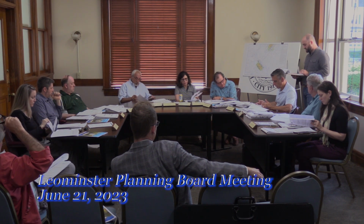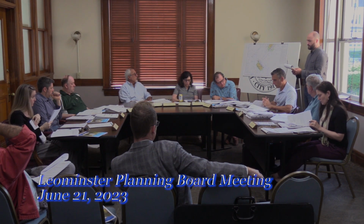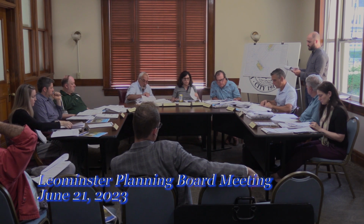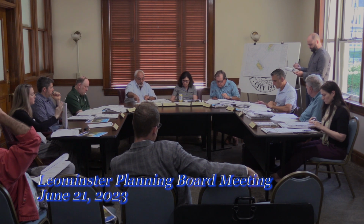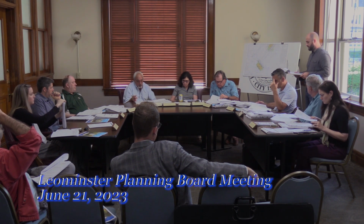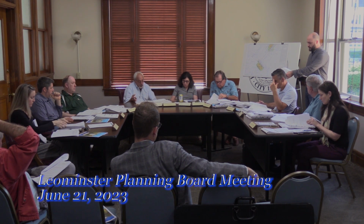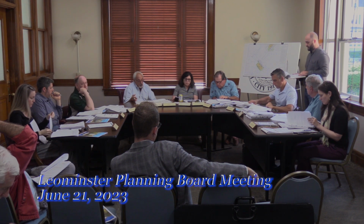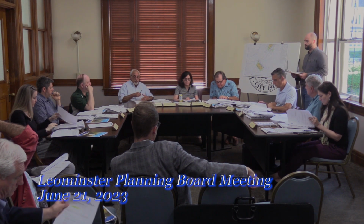Comment number two for the special permit is again relative to the landscaping requirements that we just went over a moment ago. Assessor had no comment. Community room, relative to Board of Health, construction sites, building inspector had no comments. Conservation required major reviews. DPW, again, drainage analysis I just went over a moment ago. And fire department reviewed the access, soil removal, and the sprinkler requirements for the structure itself. So pretty much the same exact comments.